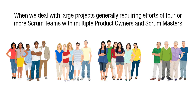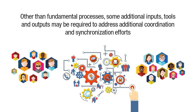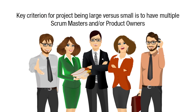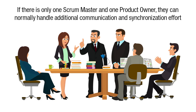When we deal with large projects, generally requiring the efforts of four or more Scrum teams with multiple product owners and Scrum masters, other than the fundamental processes, some additional inputs, tools, and outputs may be required to address the additional coordination and synchronization efforts. The definition of a large project may depend on the company and the complexity of projects undertaken. The key criterion for a project being large versus small is to have multiple Scrum masters and/or product owners. If there is only one Scrum master and one product owner, they can normally handle the additional communication and synchronization effort.